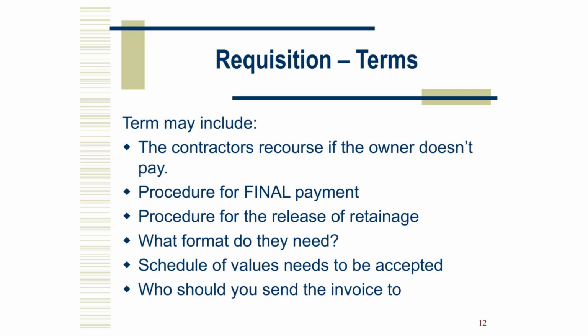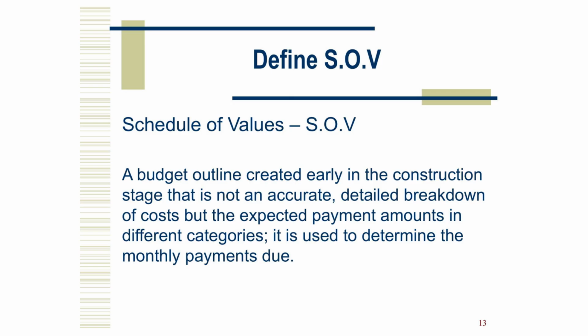Do not do that. The schedule of values is your project's billing roadmap. It is not a perfect cost breakdown. It is a reasonable distribution of the contract sum across definable activities so we can bill progress cleanly. Treat it like a baseline for the entire job.